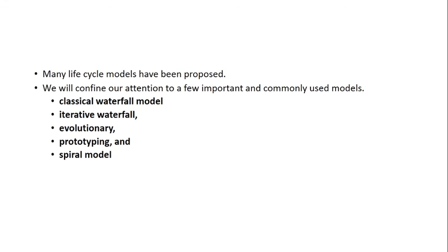So in the second iteration, I'll be developing another module. So once the counseling is over, then I require an admission module in the month of August. So I have time now. I can develop the third module in that span. So this is how in increments we will be developing and deploying our system.